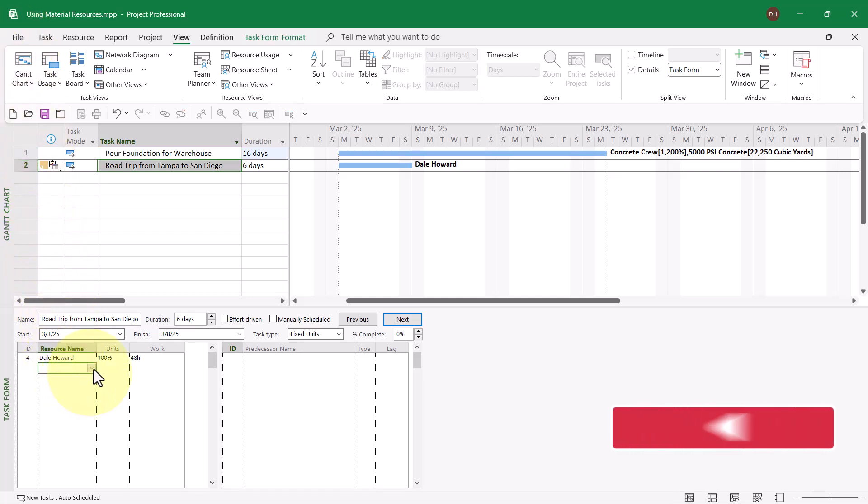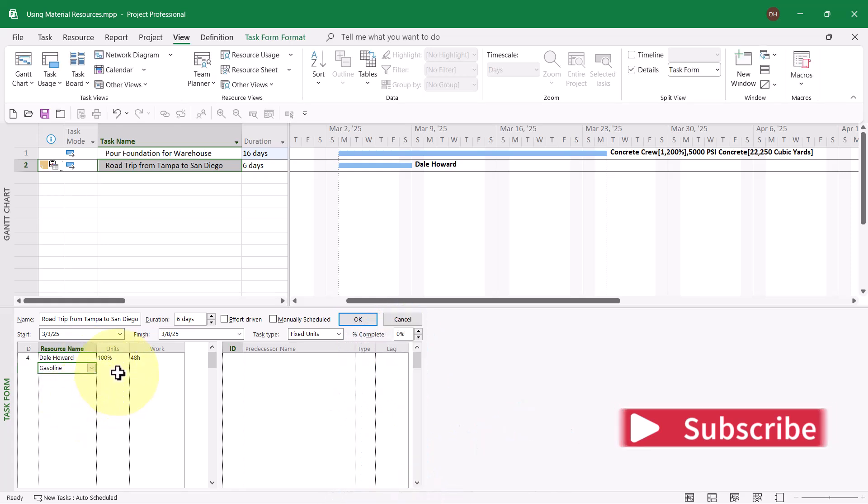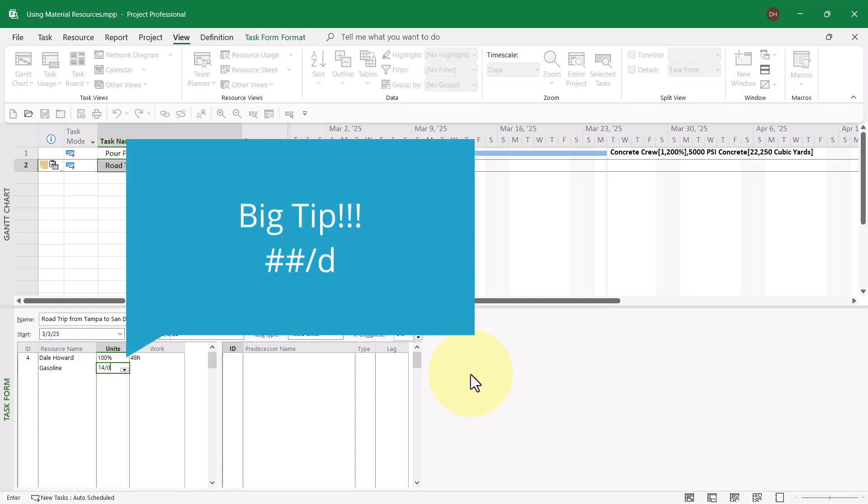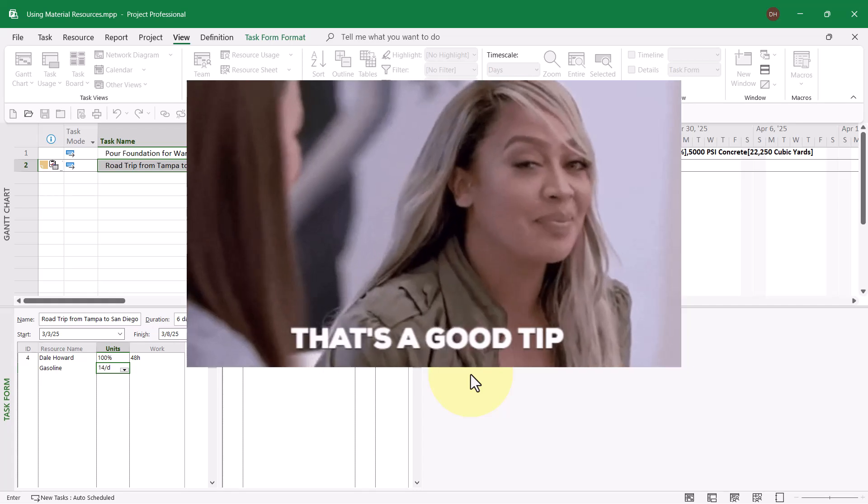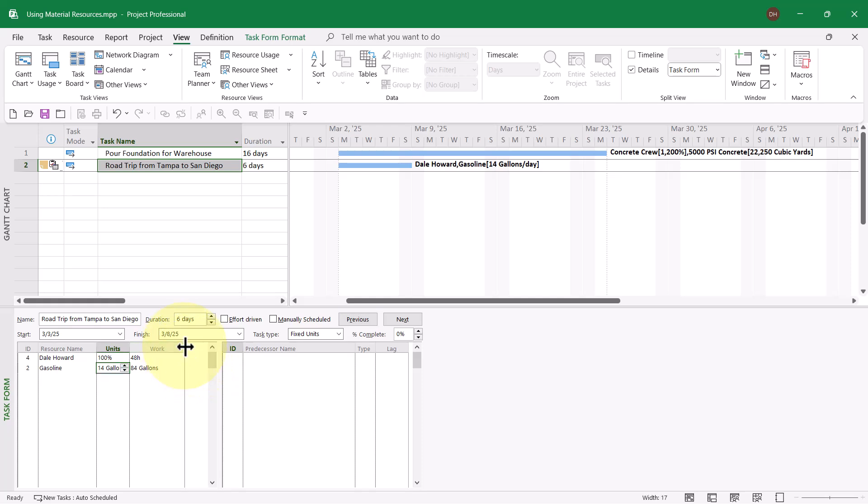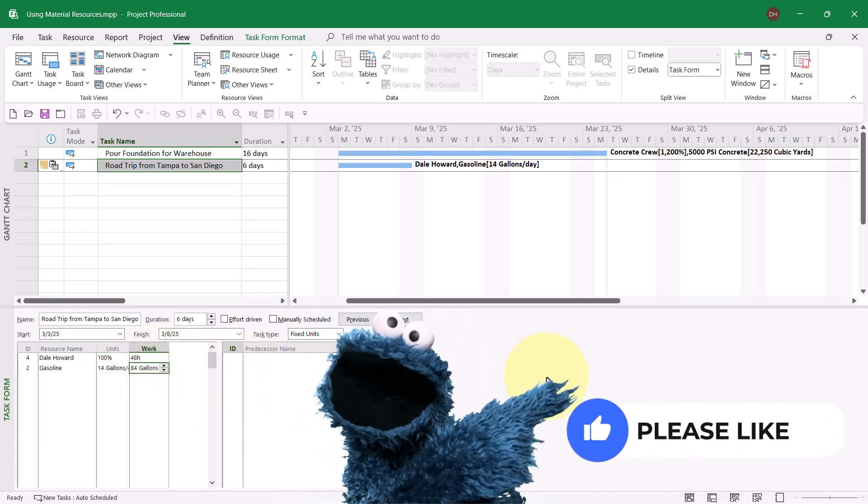So in the task form pane, I'll go ahead and select gasoline and then to enter a variable consumption rate, I'll tell Microsoft Project how much gasoline I'll use per day. My car gets pretty good mileage. So generally speaking, it'll take me about 14 gallons per day of driving. When I added the slash and the letter D for day, Microsoft Project now knows I'm entering this material resource using the variable consumption rate method. Also, when I click the OK button, notice now Microsoft Project says I'll be using 84 gallons of gas over the six days of the trip.